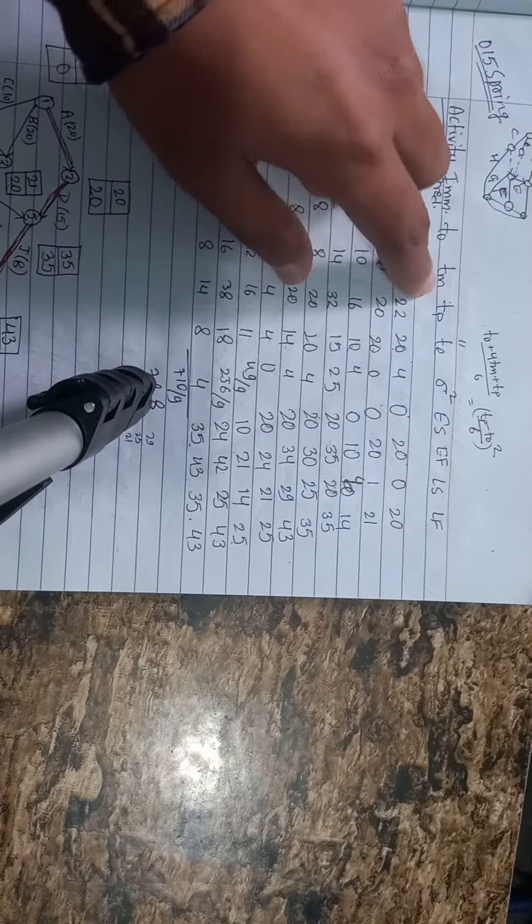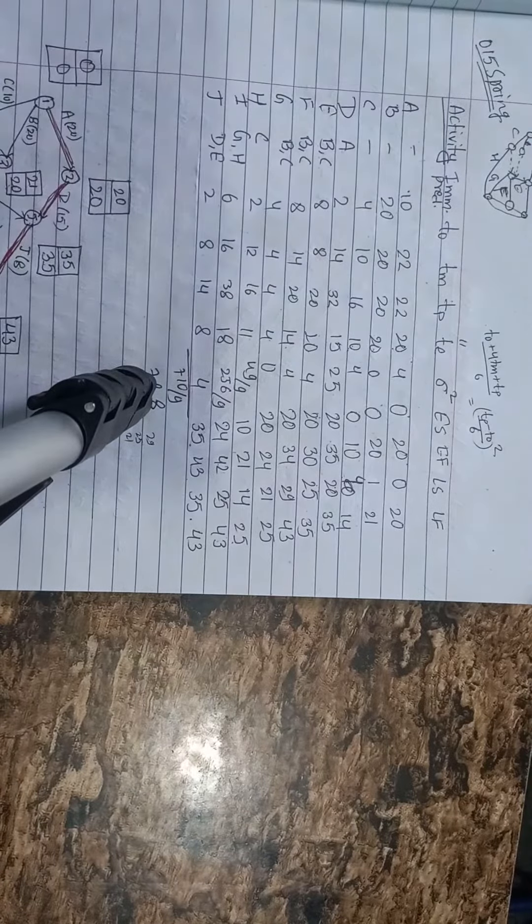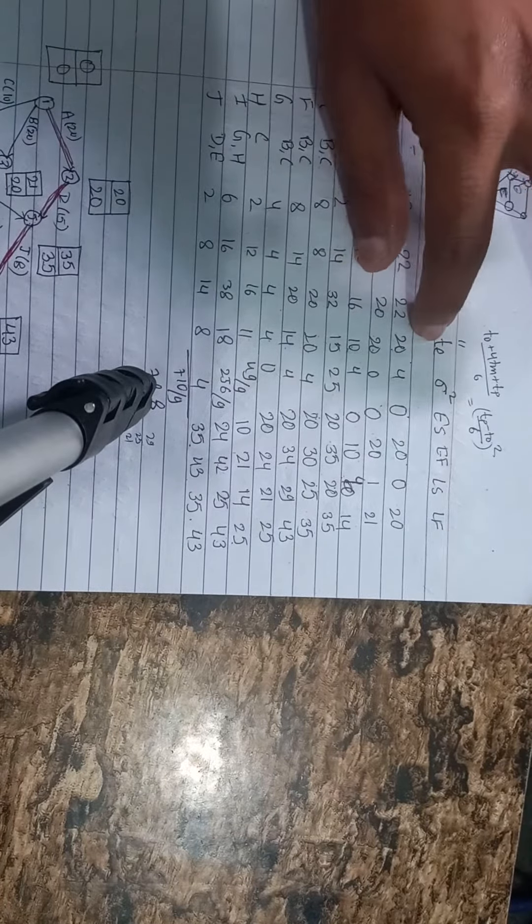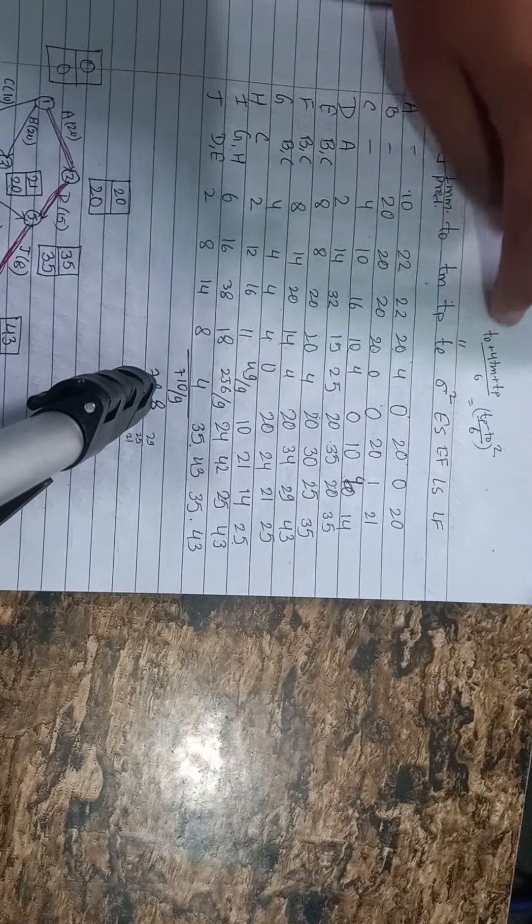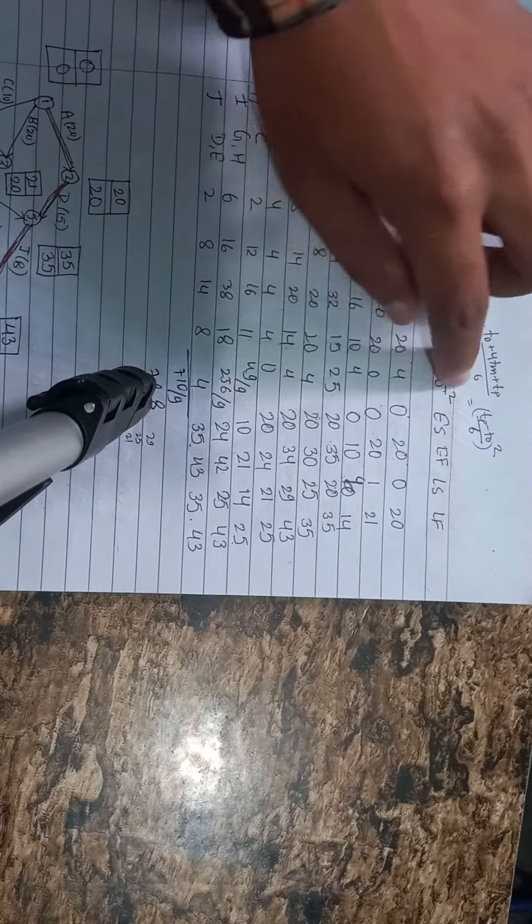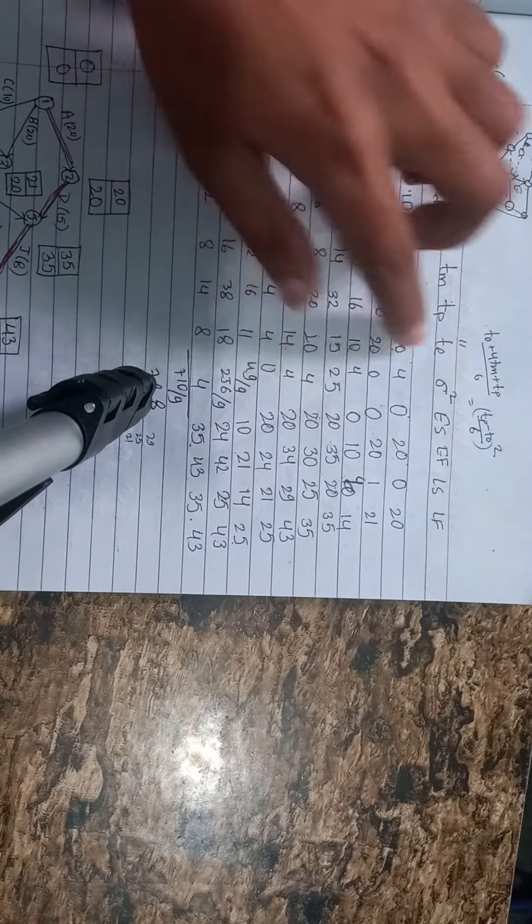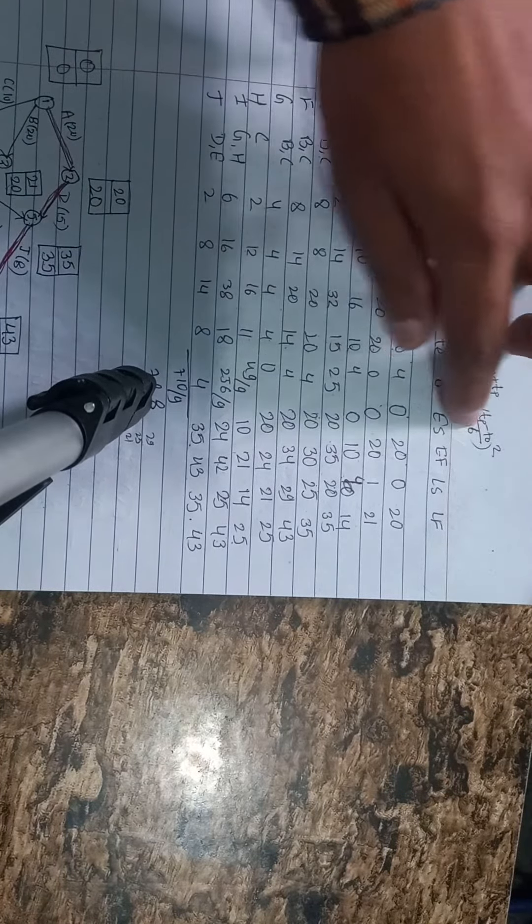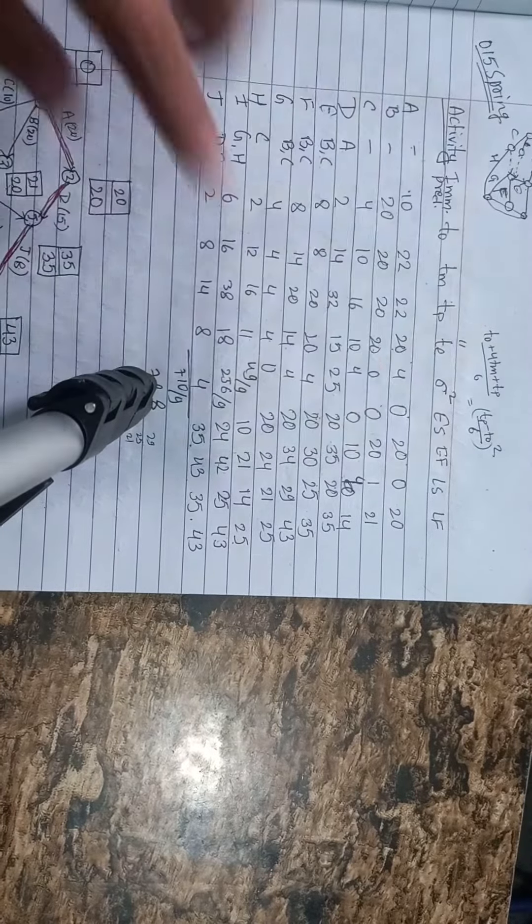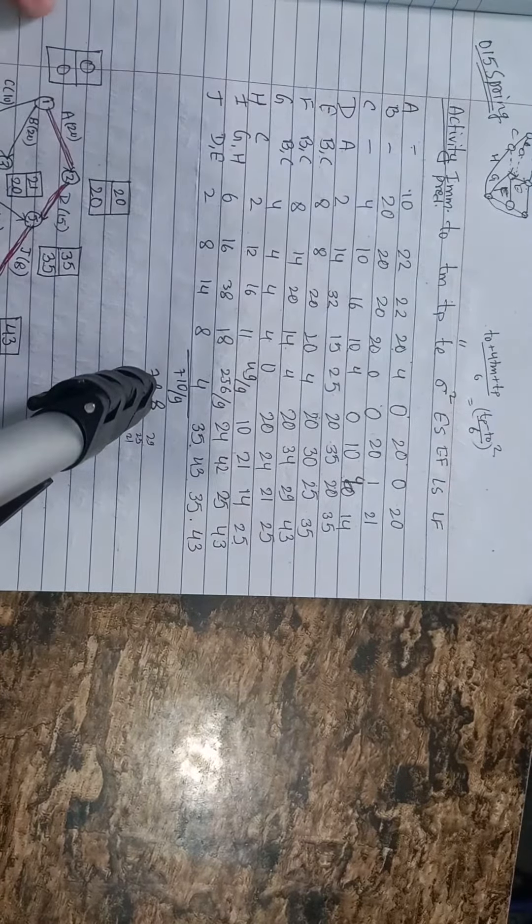Optimistic, most likely, or pessimistic. And I have to calculate this formula. And I have to calculate sigma square. Sigma square is tp minus t0 by 6 square. And I have to calculate this diagram.